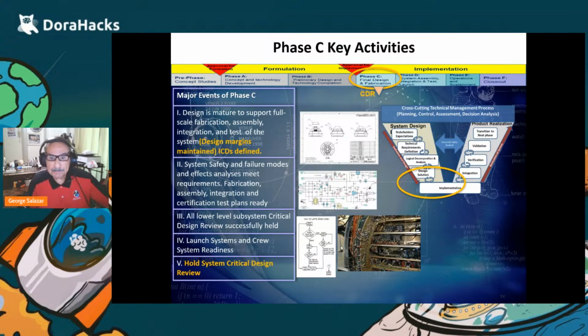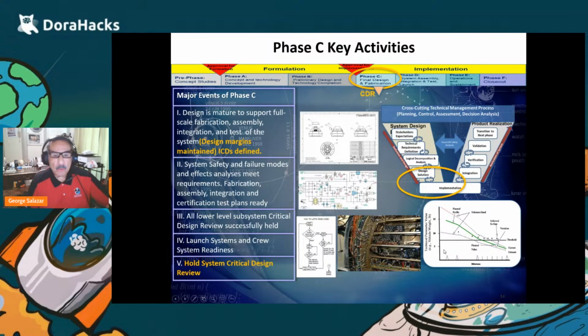All right, and of course you're also looking at these tracking charts related to a critical parameter, like for example power, size, or weight. And it's a way of making sure that we're not going over a particular critical element that we're watching.